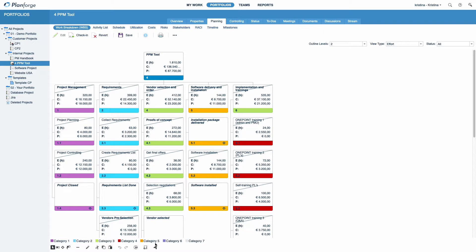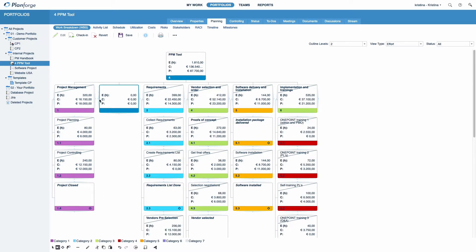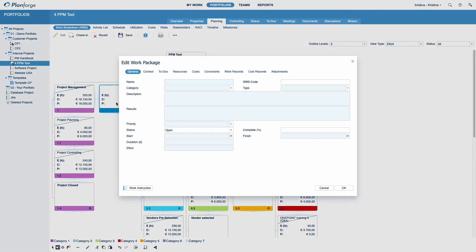Now select the Draw Activity tool to create new activities. Simply click on any insertion indicator that appears to add a new activity to the given position. Double-click the activity to name it.